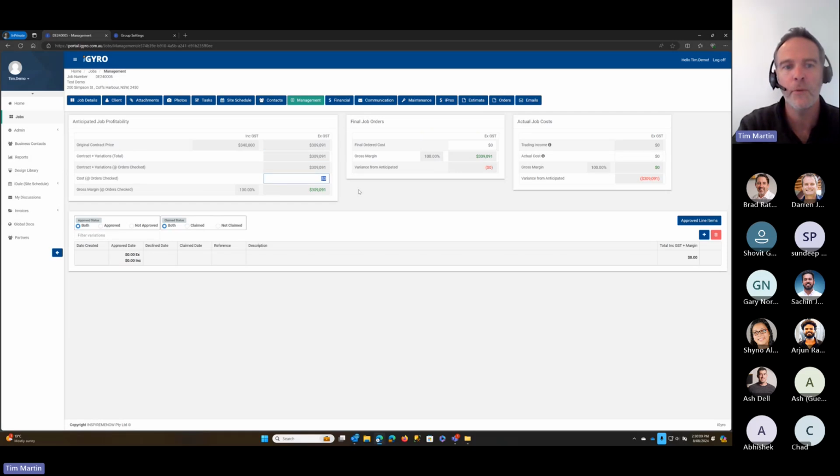So this is really a retrospective check so that you can go through and compare, say, your costs of your job or your expected costs at an early stage compared to when the job is finished. This one, for example, is when you've completed your orders, you're just about to start your job, you would know what your estimator is or your bill of quantities value.